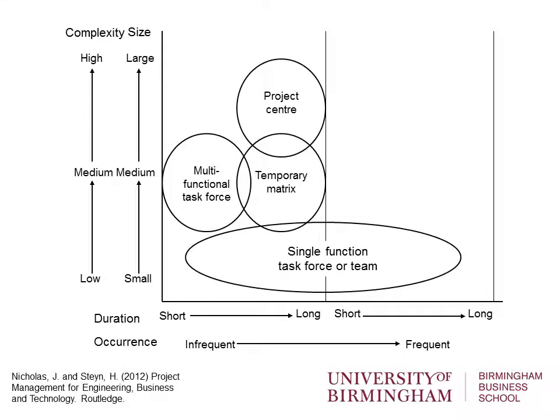Where you have large projects happening within an organisation, but they're infrequent projects, the organisation might set up a project centre somewhere within the organisation, or even outside the organisation, tasked to deliver the project and procure the resources wherever they're needed from, maybe within the organisation, maybe external to the organisation.